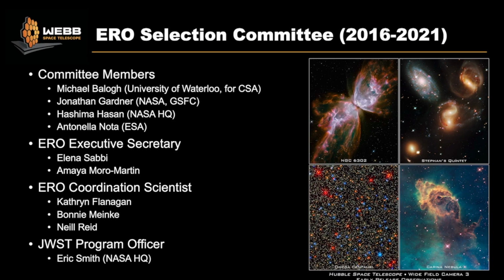And in a big part, this was because of the special orbit of JWST, where JWST could only see about 20% of the sky at any given time. And so because we didn't know exactly when launch was going to be, so we didn't know when the early release observations could be executed, we had about 120 hours worth of time to use for the EROs. We had to essentially make a prioritized list, and then depending on when the observatory was available to us, we'd pick the best targets accessible to us at that time. And so that's what we did. So there was essentially a script that we could go through, and so depending on how much time we have to do our observations with this instrument, which targets are available, and then go down the list in that way.